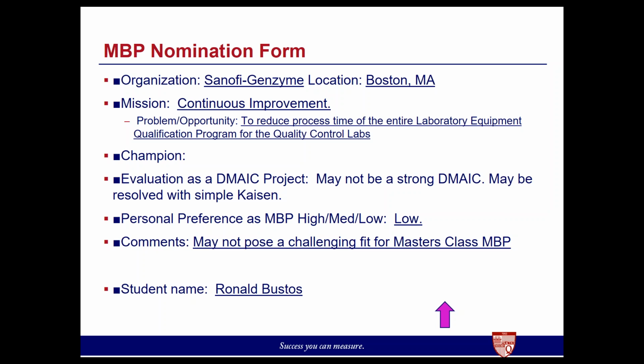This particular project was on how to qualify a piece of equipment. If you want to bring in a microscope to test your drug before releasing it to somebody to inject themselves with, it has got to go through some rigorous testing. Qualifying these instruments to the point of being acceptable to release takes this company about, we counted, 400 days, where the industry standard was maybe 100 days. So that was the big project.